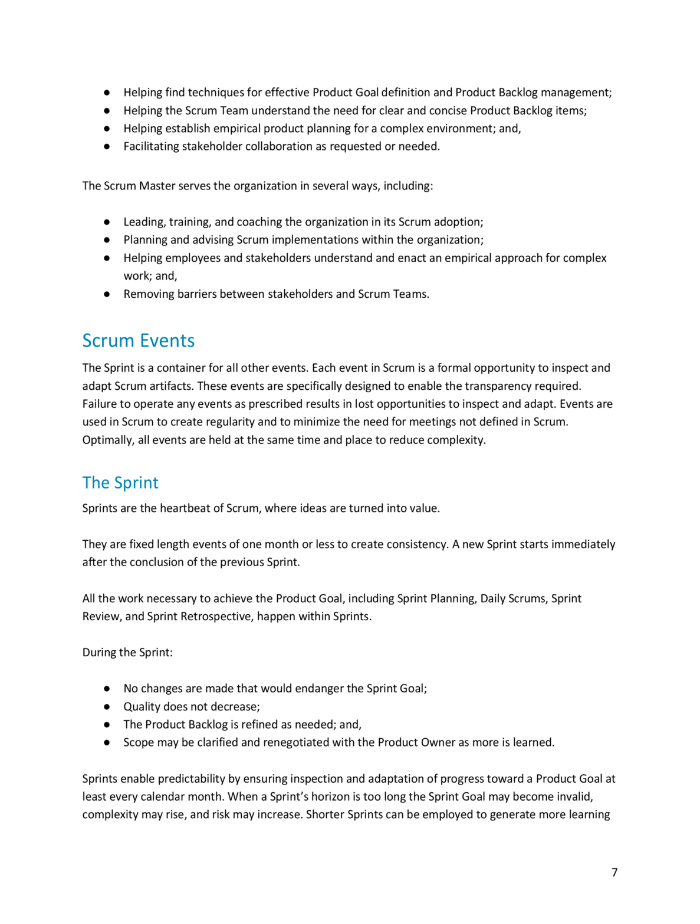The sprint. Sprints are the heartbeat of Scrum, where ideas are turned into value. They are fixed-length events of 1 month or less to create consistency. A new sprint starts immediately after the conclusion of the previous sprint. All the work necessary to achieve the product goal, including sprint planning, daily scrums, sprint review, and sprint retrospective, happen within sprints. During the sprint, no changes are made that would endanger the sprint goal. Quality does not decrease. The product backlog is refined as needed, and scope may be clarified and renegotiated with the product owner as more is learned.